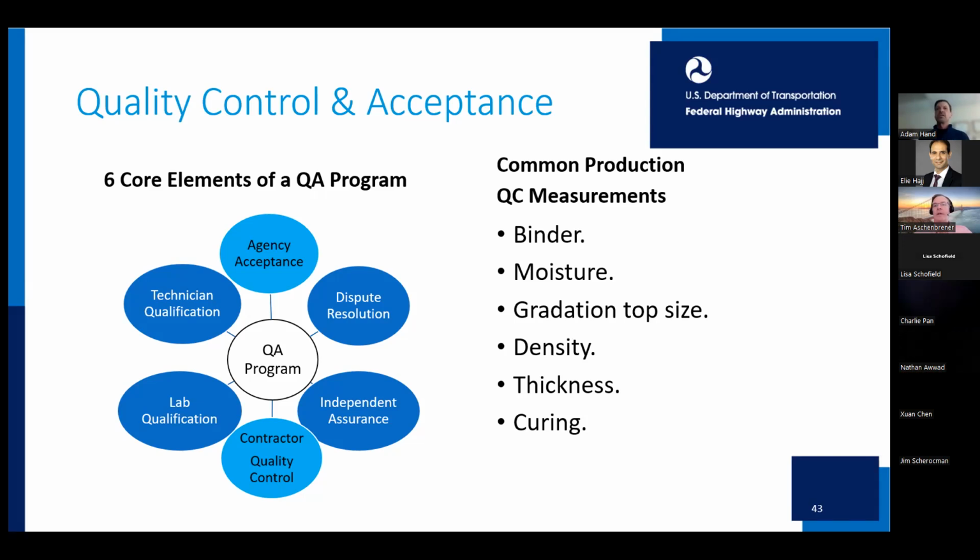It's a really good one. I'm not trying to pat FHWA on the back because we're doing this work for FHWA, but I really believe it's really, really well done. I think anybody writing a spec, if they do that, it makes it clear to everybody exactly what has to be done. So they list, again, mix design, quality control, acceptance, and then they list the test methods that were used. They list the frequency, the sampling location, all those things. So it was crystal clear for everybody.